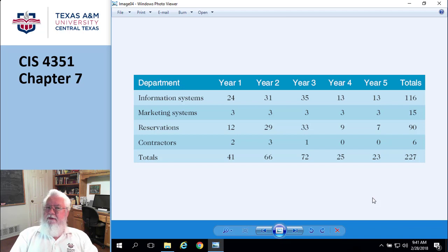Training is not free. Now, training has two things: a direct cost and an indirect cost. Direct cost is how much you're going to have to spend to get training materials put together and conduct a class. And indirect is they're losing productivity while they're in your class. Okay, this is a good place to stop for the 15-minute mark. We'll finish this off in just a few.